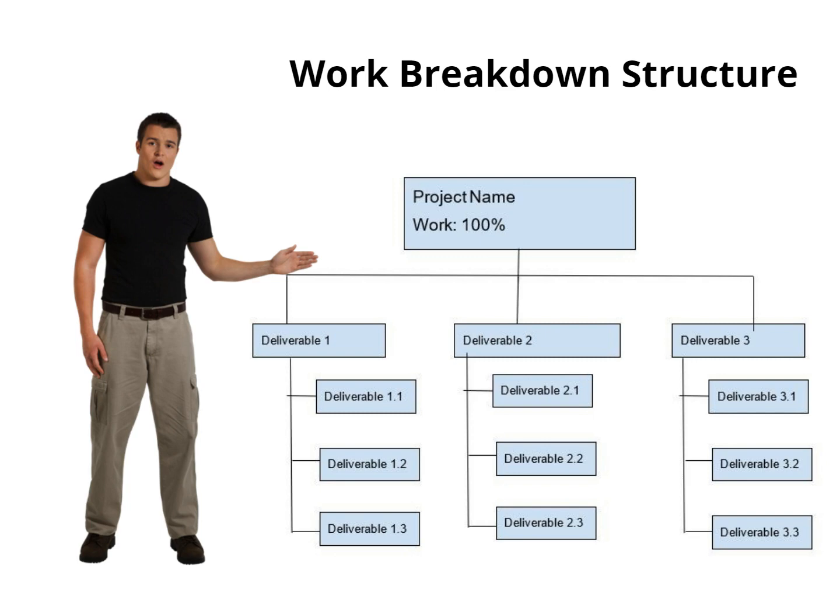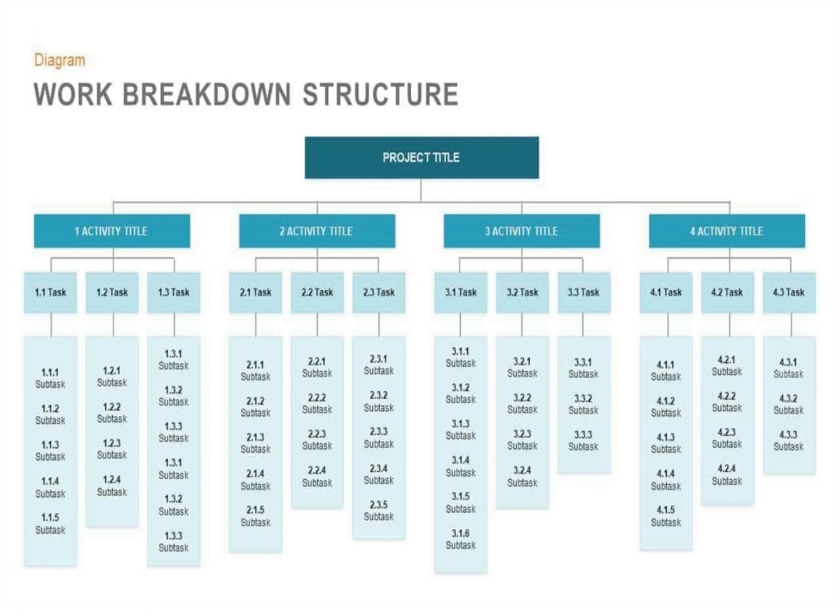Larger and more complex projects often require a larger WBS. The size of the WBS is directly related to the amount of work on the project and how that work is divided into work packages. The WBS can be developed around the project phases or the project units or functions that will be performing the work. A WBS organized around the project phases facilitates the understanding of the amount of work required for each phase of the project. A WBS developed around the project units or functions of the project facilitates the understanding of the amount of work required for each function.